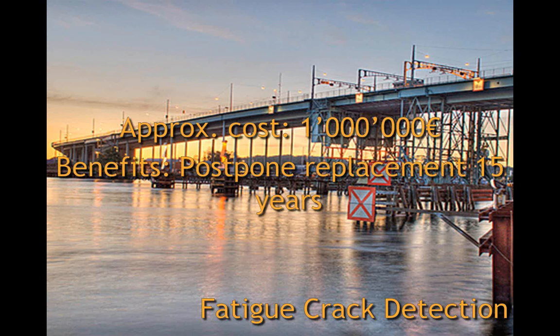For a cost which was relatively high, at around 1 million euros, it was possible to postpone the replacement of the bridge by several years, and so that corresponded to a big saving for direct cost of rebuilding the bridge, but also indirect cost that would have been created by, for example, the unavailability of the structure during the reconstruction.